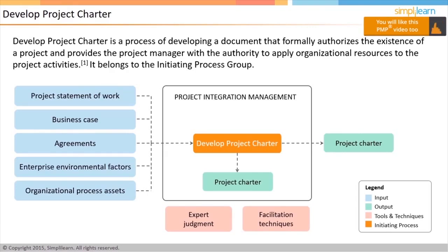It is important to point out that a project charter is not a project management plan. The detailed risk, schedule, cost analysis, etc. is part of the project management plan and should be done during the project planning phase, when there is more detail on the availability of the project to do so. The charter should be sufficiently high level to accommodate the minor changes that might arise in the project.